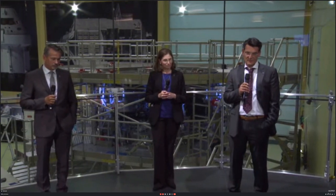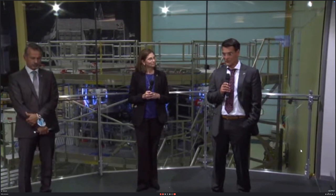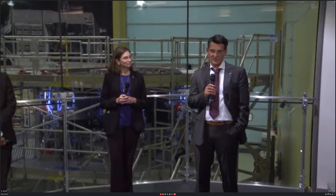I can take that. So the overall ESM contract we have with Airbus, and this includes the development of the service module, but also the first 6 flight units, is in the order of €2 billion. And ESM 7 to 8, this is the next batch of ESMs we are going to negotiate. And these ESMs will be required to further pay off obligations we have in the ISS, but also possibly contributions to the Gateway.